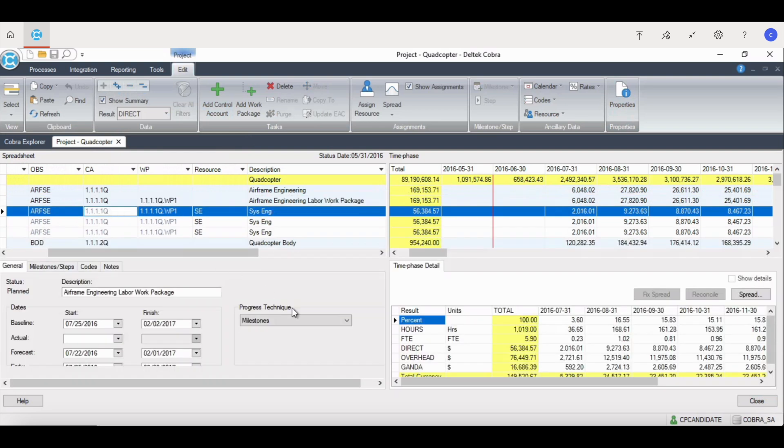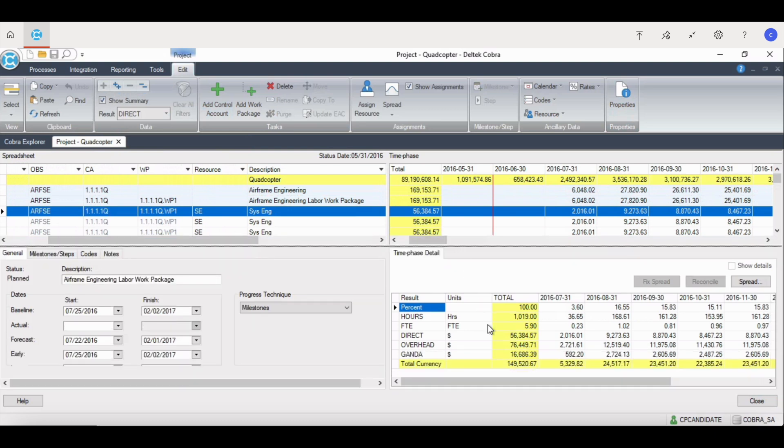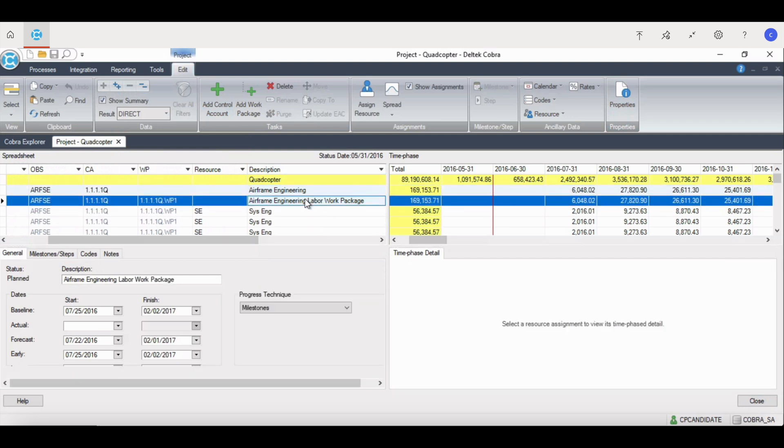The fourth quadrant shows the time phase details for a specific resource, from the input level, hours or direct, down to each individual burden, such as overhead, G&A. This will show the full cost buildup. The quadrant only shows data when a resource is selected in the spreadsheet quadrant. If a control account or work package is selected, this quadrant will be blank.